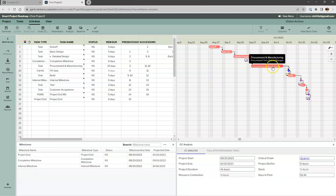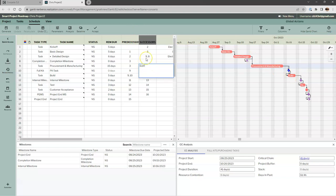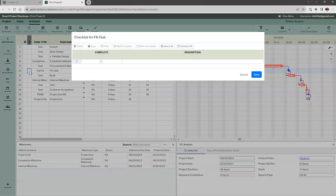To add that, I come over here and insert a special task — this time a full kit task — and the full kit task will be placed in front of build. It will follow procurement and manufacturing, so I draw that dependency. Now I can see there's an existing dependency from procurement/manufacturing to build that I no longer need, so I'll remove it for clarity.